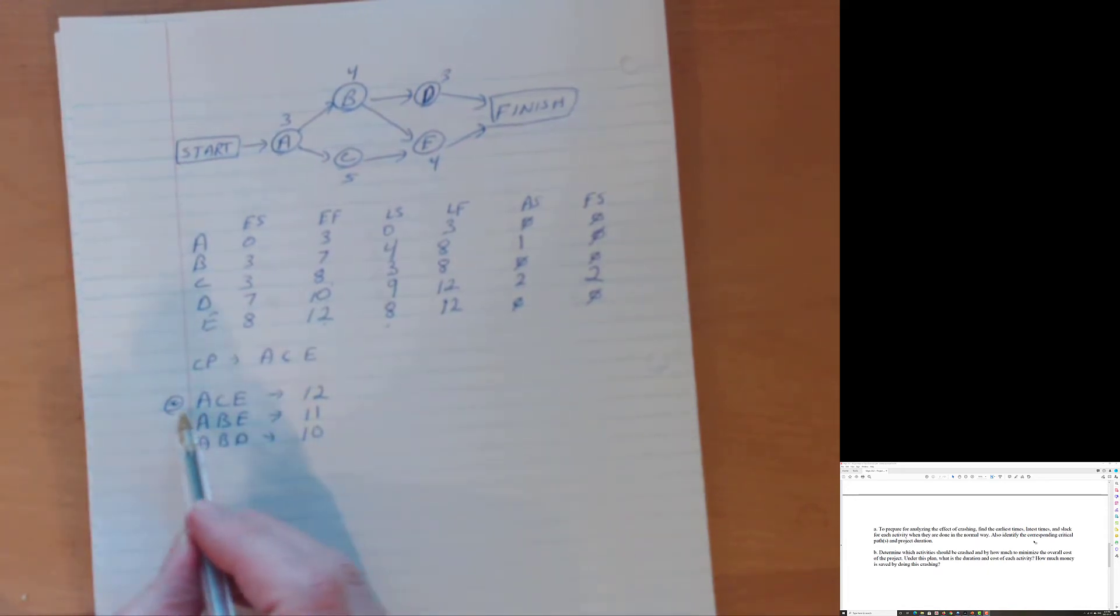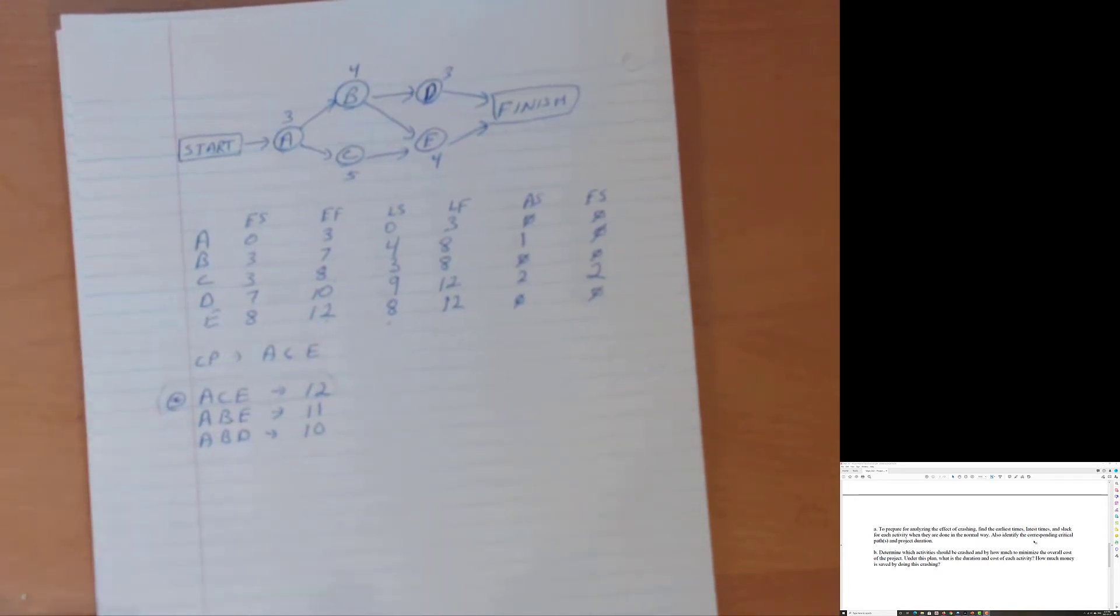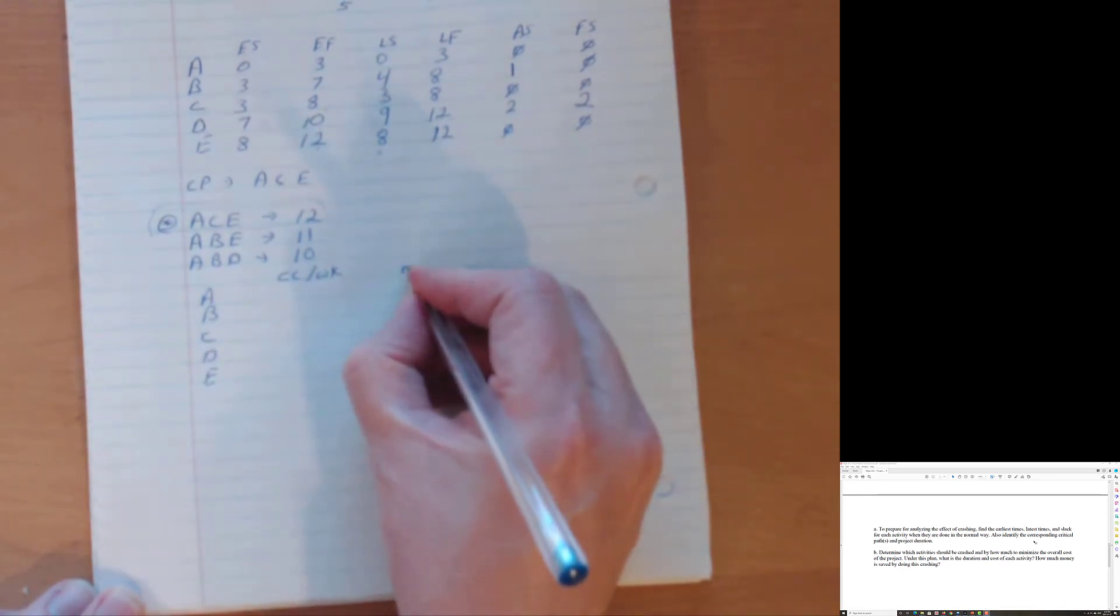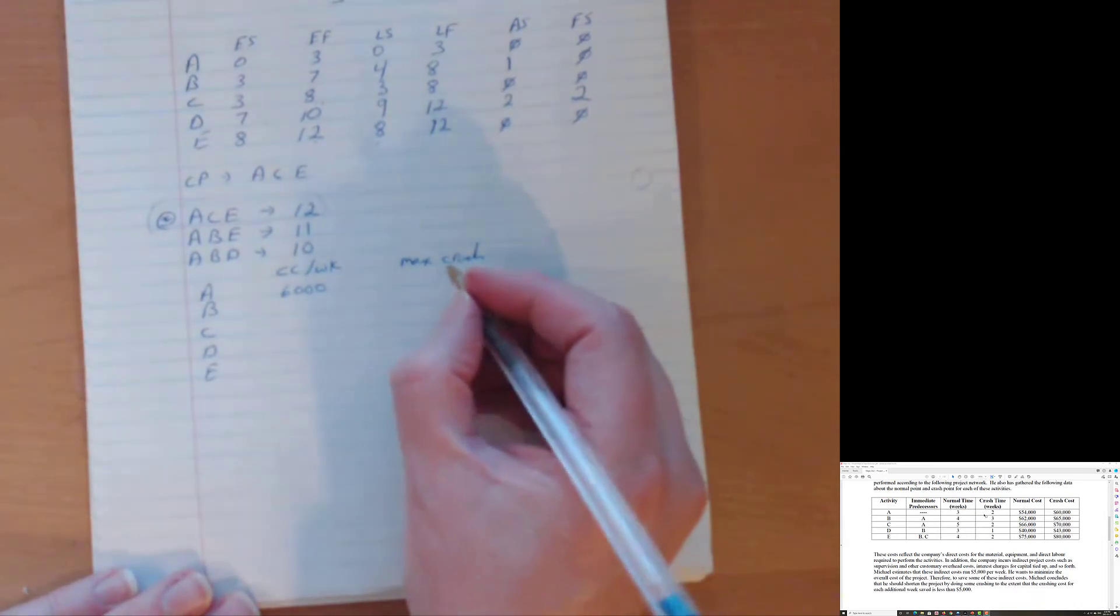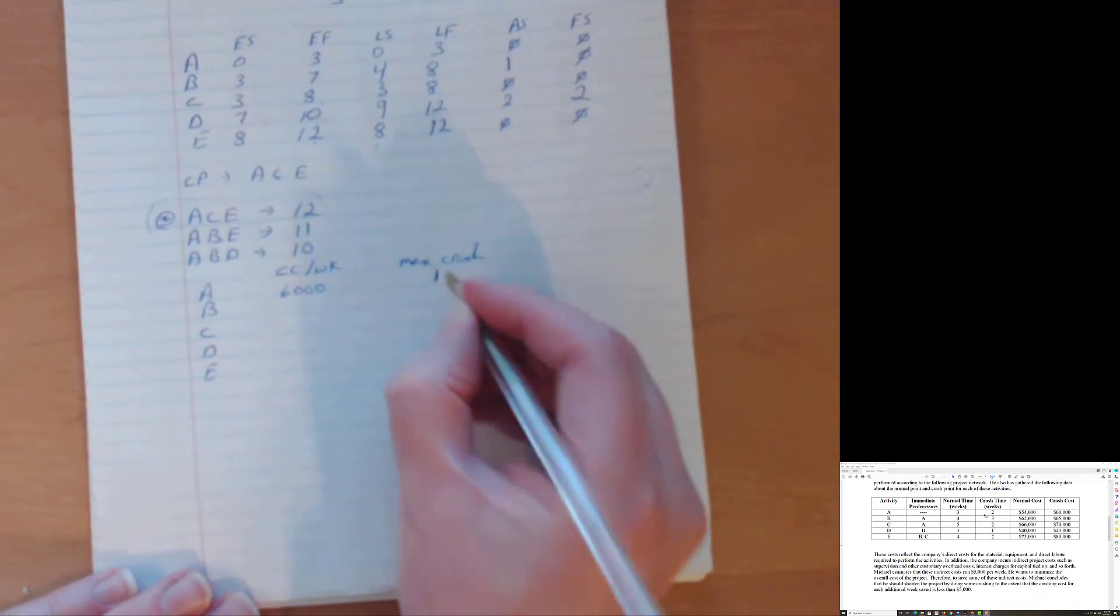We have to do a little bit of calculation in this particular problem. So we're going to look at our A, look at our B, look at our C, look at our D and look at our E. And we're going to find the CC or crash cost per week and the maximum crash time. So we have to determine that old school. And so we'd scroll back up to the normal cost and crash costs and look at the tables. And we see that crash cost is 60,000 minus the normal cost of 54,000, which is 6,000 divided by three minus two. And that gets a crash cost of $6,000 per week. We can go from taking three weeks to taking two weeks, which means we can crash A a total of one time or one week.